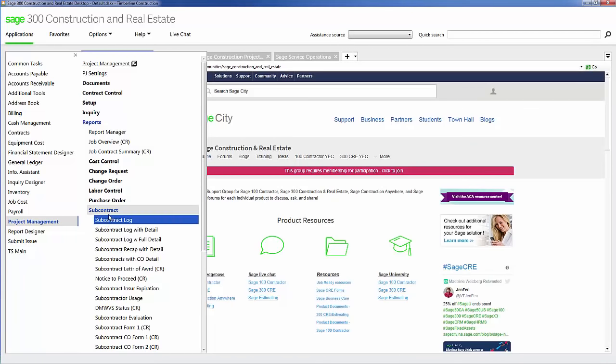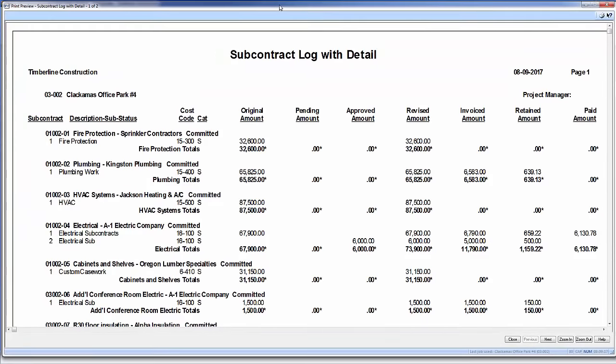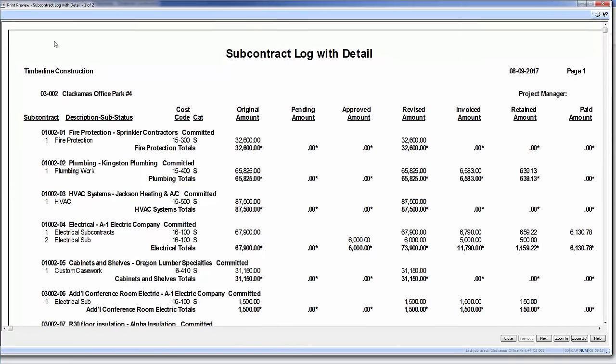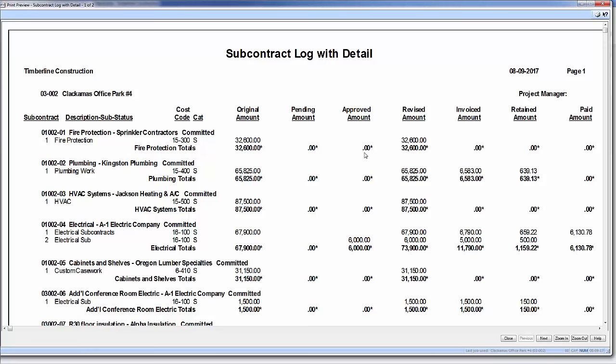Another great report is my subcontract log with detail. In this particular report, I can see all of the subcontracts I have on Clackamas Office Park. So I have this one here for fire protection from sprinkler contractors, plumbing from Kingston Plumbing, some HVAC from Jackson Heating and Air Conditioning, electrical with A1 Electric, and the cost codes associated with their subcontracts. I can also see the original subcontract, if I have any pending or approved change orders with them, what the revised amount of their subcontract is, and how much I've been invoiced by that sub against these contract items, how much I've held in retainage, and how much payment I've actually issued them against their subcontract agreements.